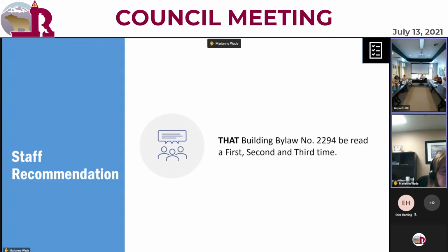Sure. Thank you, Your Worship. So the point of that is that in our review of other municipalities, when you have what they call a letter of assurance by a certified professional, which is a Schedule A, then that Schedule A becomes the coordinating professional who does take on liability for a complex build, and as such does the field reports and inspections, and there's a reduced time on our staff. So they have increased those fees so that there's some compensation because we don't have to send staff out, and the liability is with the certified professional. So it's both, it's liability and time. Yes. You're comfortable with that? Yeah, that makes a lot of sense.